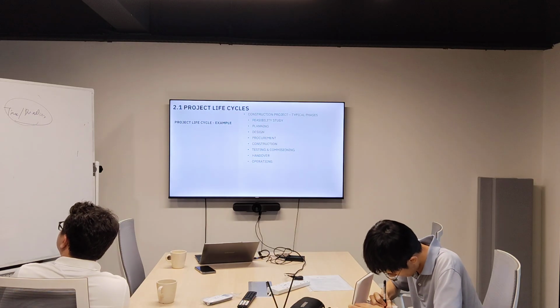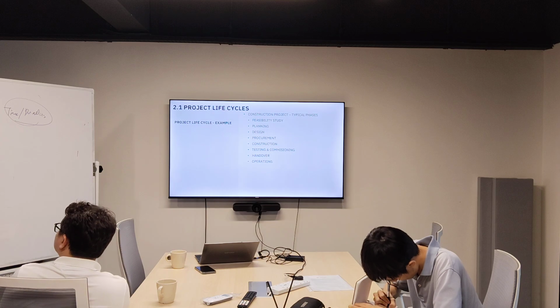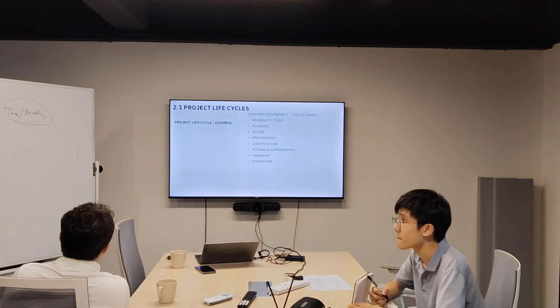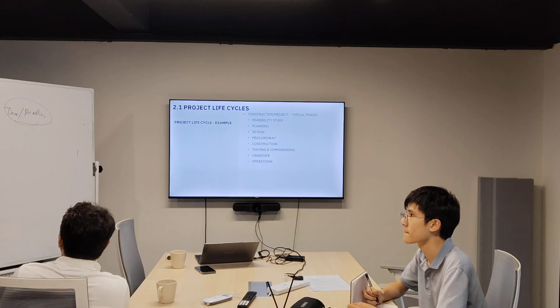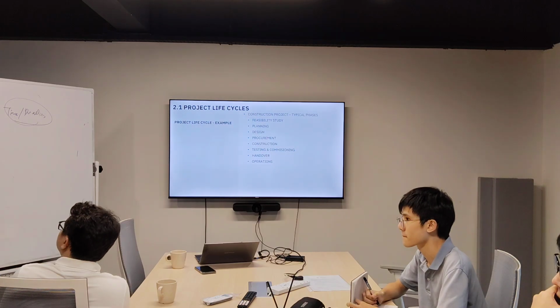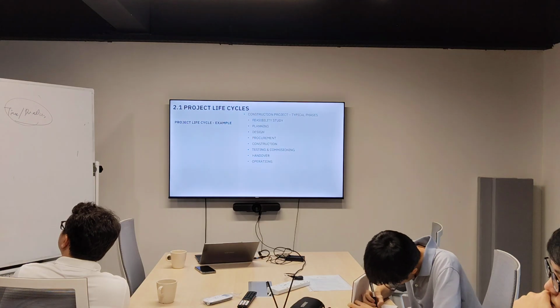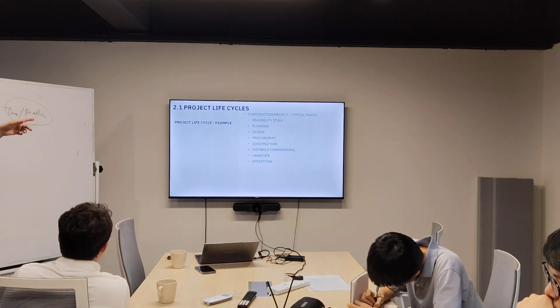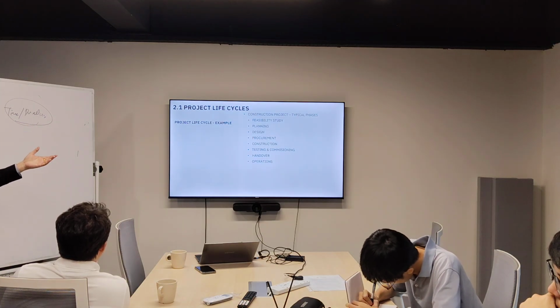You cannot just say, hey, I want to start the project, then start it. You need to conduct a feasibility study. You need to find the land, and you need to know what kind of project is suitable for the land. Either it's commercial, industrial, or residential. So that one we name as a feasibility study.